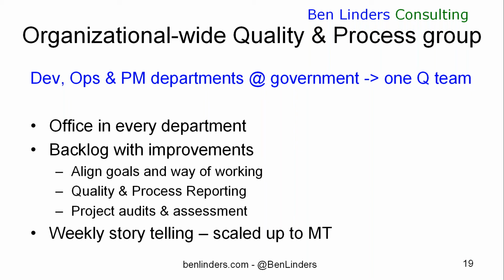And we also set ourselves work in progress limits. So we said we're only going to be working on 4 improvements maximum at a time. If we want to work on another improvement, we need to finish one first before we start another one. We're not going to have too many improvements ongoing at the same time. We're just going to take those 4, and when we finish one, we're going to start with another one.